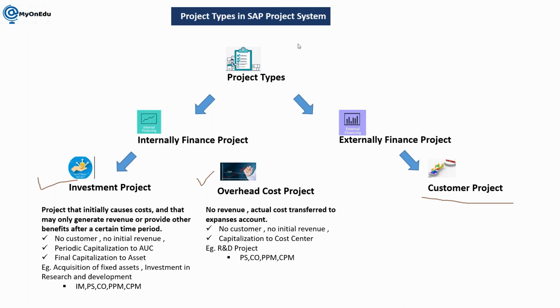When we are talking about investment project, we can manage it without IM also, by configuring the complete system only with the help of investment profile. We can manage it in project system itself if you don't want to control the budget at a higher organization level. Sometimes the question comes to mind whether we always need to go with IM for investment project. It is not 100% correct.